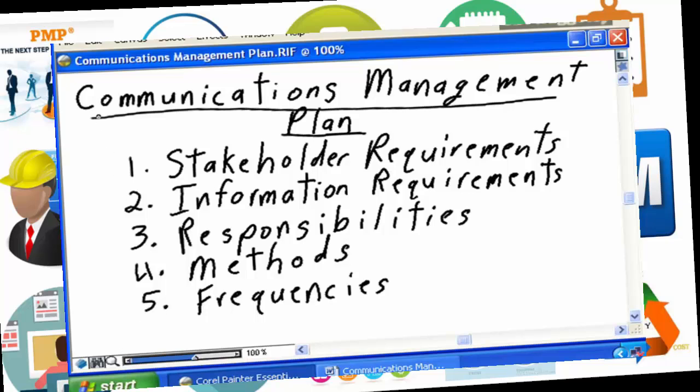The Communications Management Plan summarizes all of the information that you as the project manager have put together to ensure that you've effectively identified who cares about the project, what information they require, and how it's going to be distributed. It's going to ensure that you're addressing all of the aspects to the communications channel, the encoding, the message, the medium, ensuring that there is no noise to prevent the communications from happening, and that there is successful decoding at the other end.